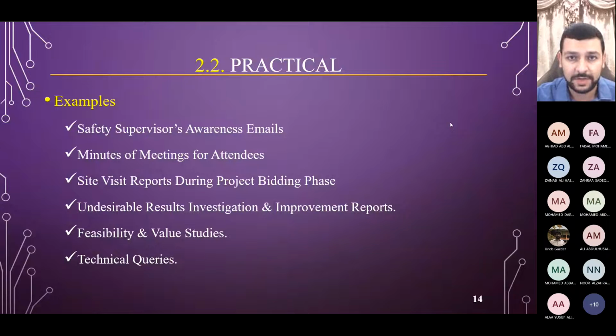Usually we have something called a technical query. It's basically a question asking the designer, okay, we've studied your design, but we found this issue in this part of the design. What is your proposed solution? Whatever the reply is, sometimes it's acceptable, sometimes it's way too creative, so out of the box that it's not even possible to fix, and sometimes you have to modify it a little bit. It's a two-way communication. All of these items come in different sorts of documentation.